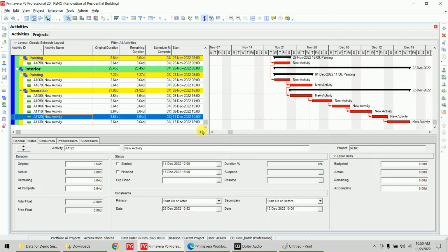99%, if you have the relationship, you can define the activity start or finish date with the help of relationships, then you can always use only the relationships. This is not a good practice, to apply constraints anywhere.